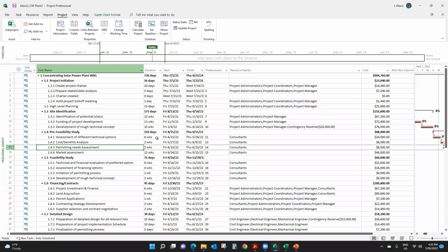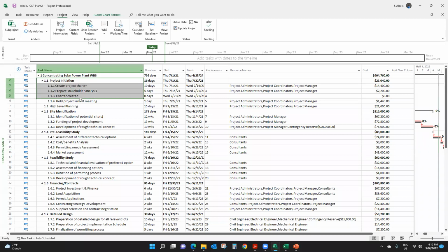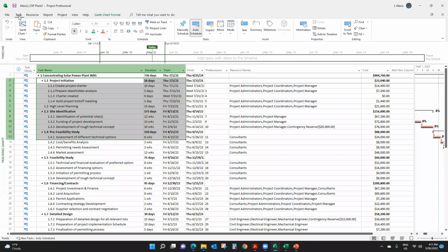For example, you can assume that anything from the start of the project to date, we're not in June yet, so I'm going to start to April 15, and I'm going to say all those tasks, deliverables and activities are 100% complete. So I'm going to click on task and say 100% complete, right?